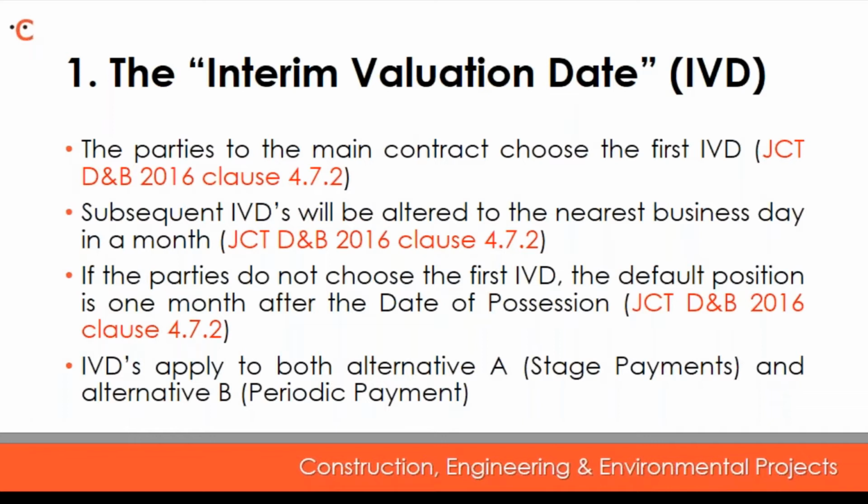So due to the changes in counting days, this will affect the due date and the 5-day period for the issue of the payment notice, the last day for giving a pay less notice, and also the final date for payment. Employers, and in relation to subcontracts, contractors, should bear in mind the importance of serving payment notices and pay less notices on time to avoid losing the contractual right to do so.